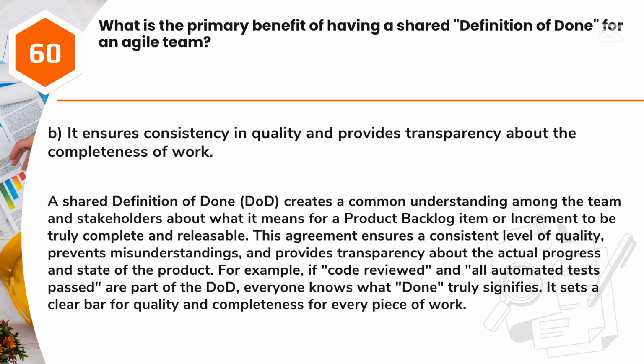This agreement ensures a consistent level of quality, prevents misunderstandings, and provides transparency about the actual progress and state of the product. For example, if code reviewed and all automated tests passed are part of the DoD, everyone knows what done truly signifies. It sets a clear bar for quality and completeness for every piece of work.